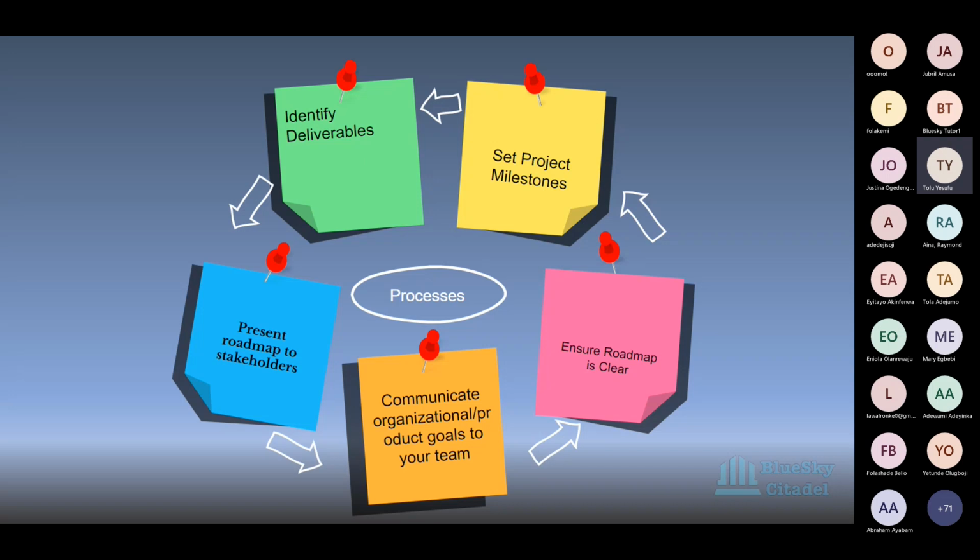You don't want to bore them with a massive document. For me, I have a project roadmap that is well detailed: I have risks on it, dependencies, activities, the timeline, and the different roles. This is something the data architect should have achieved by this point. This is what this person should have achieved. I also have different sign-off processes and sign-off timelines on it.